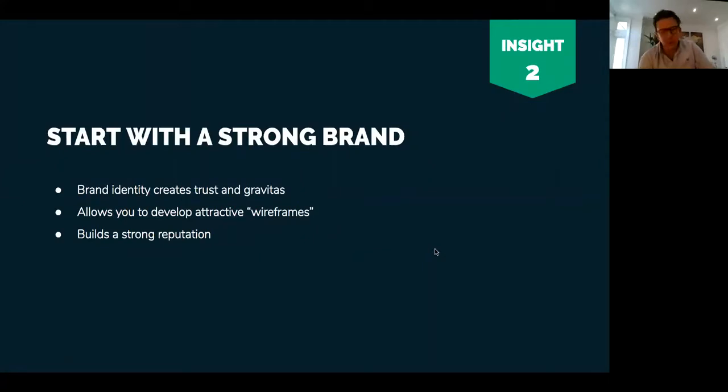Can't remember. The biggest one though is we picked the wrong technology partner to start with, and we dropped an embarrassing sum of money into a relationship that didn't work. And I was aware that that was not working about a month into a 3-month program, and I didn't fire them. And I don't do many regrets, but I knew I should have fired them and I didn't. And that cost me a lot of money.